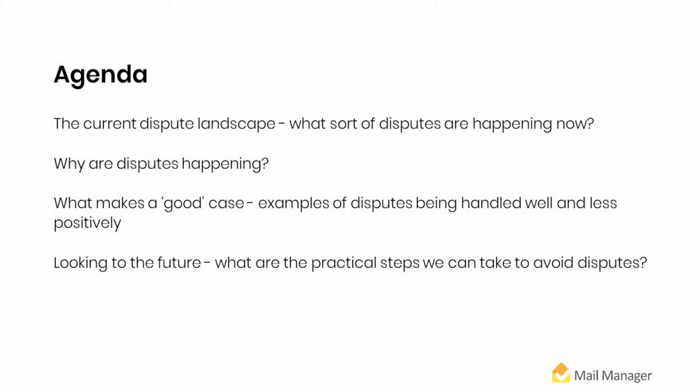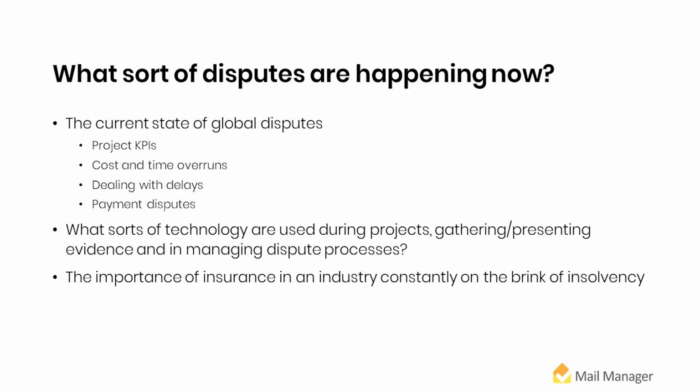So May, perhaps I can start by asking you the question first. Can you quickly outline what types of dispute you are currently hearing most about? I'd say at the moment, it would come as no surprise that a lot of the disputes one notices in the legal press are COVID-19 related. It's force majeure, having to suspend works due to people not being around or not being able to get to site if it's international. And as a result, you then have delay, time and cost overrun.